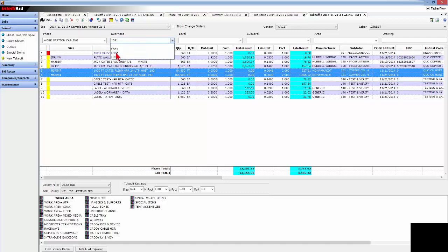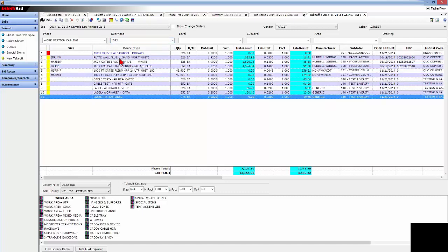Now, the 2nd floor, it's a gutted office floor. We look at our labor units as working off an 8-foot stepladder in an unoccupied area. So we've identified that 40-foot ceiling, but we're right within our standard here. We get to the 3rd floor. This is a fully occupied area.